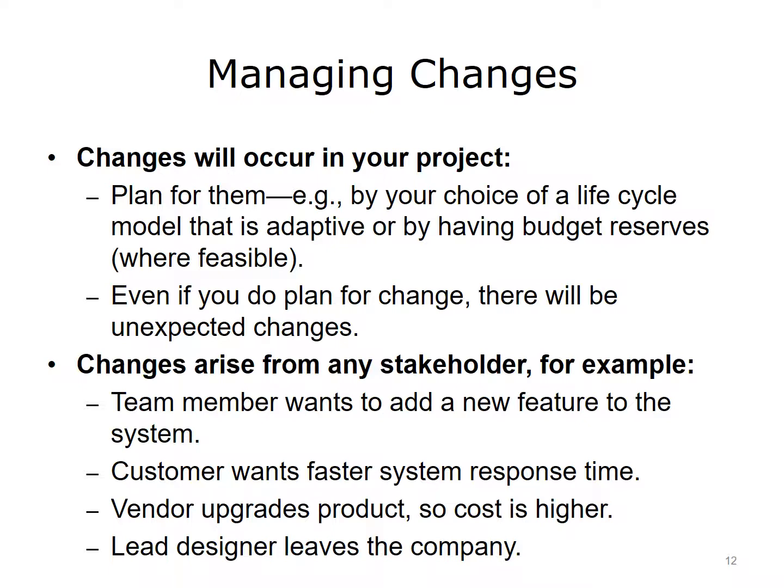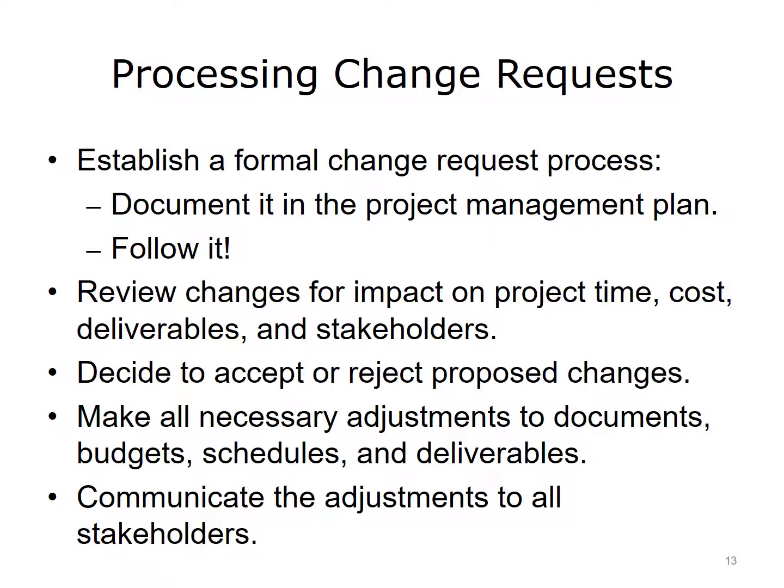Or, you can try to set aside budget reserves or pad your schedule with float days to cushion the effects of delays. When change affects your product, perhaps through a new feature to the system, you need to have established change request processes in place. These change request processes do not have to be elaborate, but they do need to be clearly defined procedures for accepting and vetting requests for project alterations. The process will need to determine the impact of a change on project time, schedule, cost and deliverables, and include a formal procedure to accept or reject it. Or, your customer organization may have such a process in place that you can adapt for your project.